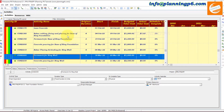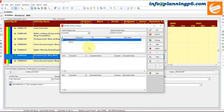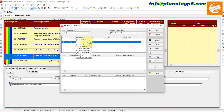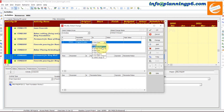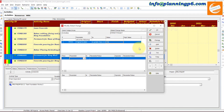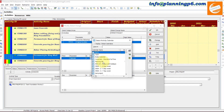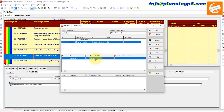The third example: we want to change the original duration. Go to Global Change, add a new one, and name it 'Original Duration'. Set the condition — for example, Original Duration is less than 15 days. In the 'Then' section, add the calendar parameter — select '7 by 24' as the new calendar — and click Change.